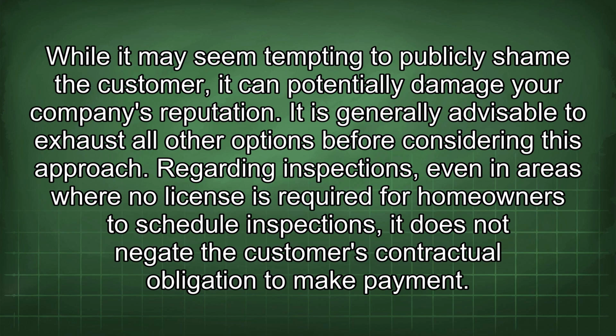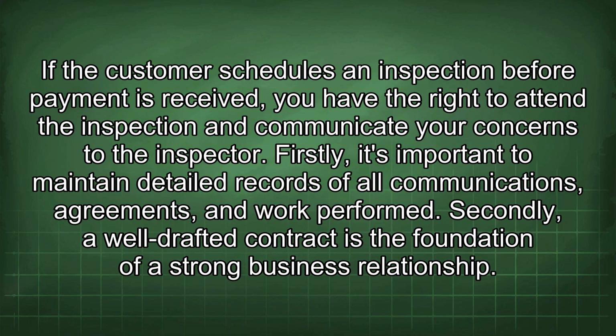Regarding inspections, even in areas where no license is required for homeowners to schedule inspections, it does not negate the customer's contractual obligation to make payment. If the customer schedules an inspection before payment is received, you have the right to attend the inspection and communicate your concerns to the inspector.